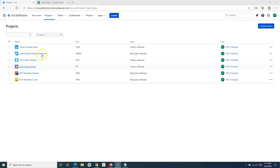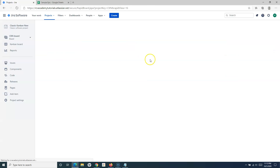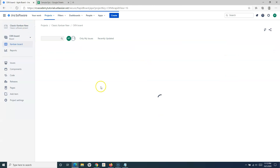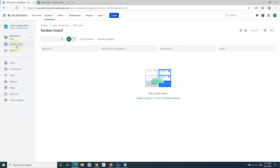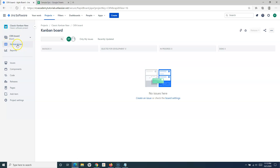We have created two Kanban projects: one is the next gen project and the classic Kanban. Let's start with the classic Kanban project. Here, if you see, you don't have any backlog option once you create the classic Kanban project, and we basically have to enable the backlog in this particular case.